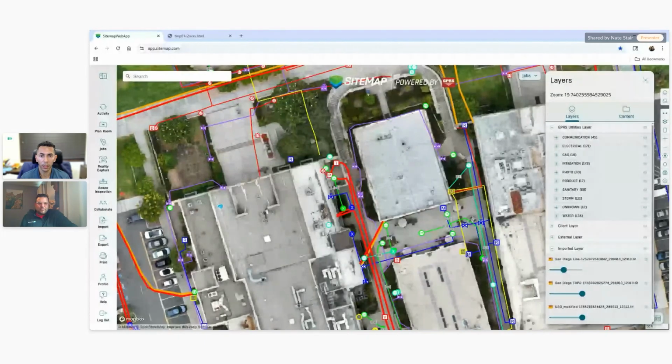We own all of those lines, so it's a bit more of a personal risk of us striking it. And it's high voltage. It's 12,000 volt service. So it definitely would cause a huge catastrophe if we were to hit one of those things. But once we get off onto these branch lines, it's about identifying it on the front end, as we've already mentioned, instead of having to find it in the field. And it's not just a labor cost or a material cost of rerouting that electrical service.